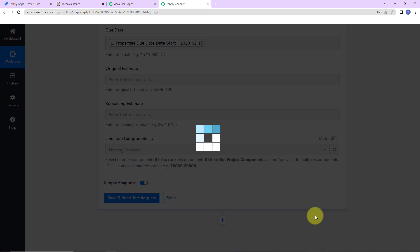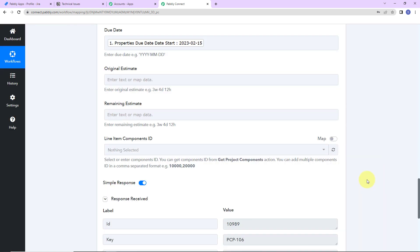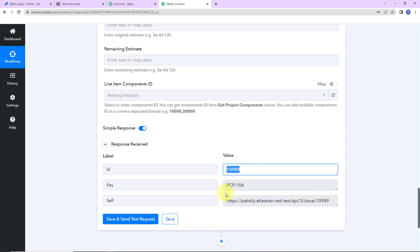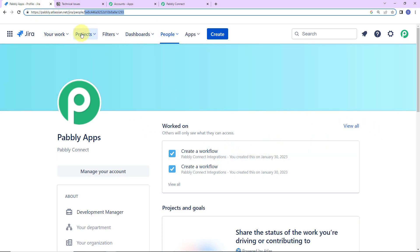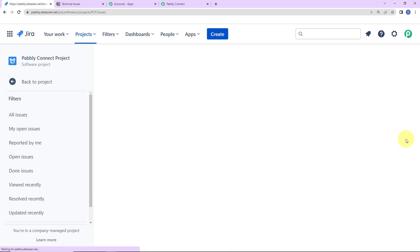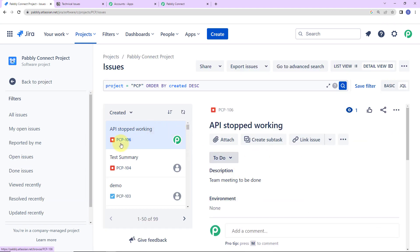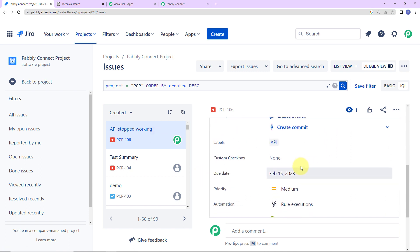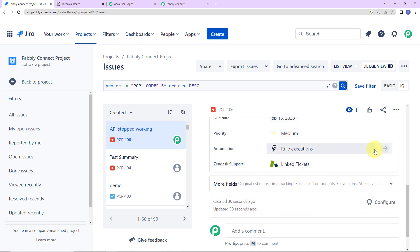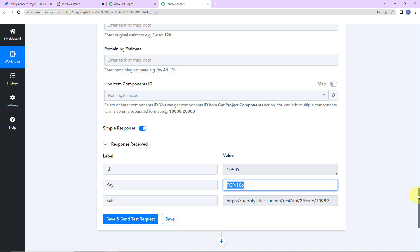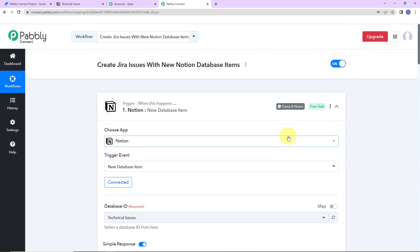Now let's click on save and send test request. Here you can see that we have received a response where our ID has been given. I'm going to copy this key and go back to Jira. Here I'm going to go to projects and navigate to the Pabbly Connect project. You can see that the issue PCP-106 has been created — the description is 'team meeting to be done,' along with the rest of the information including due date and priority. This basically means that our integration process is a success. Note that we are not checking this in real time since the trigger application has a polling time of 8 hours, but this is how the integration is going to take place.